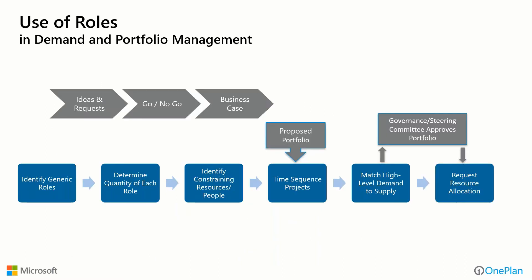All of this comes together — the demand management and portfolio management process really intersects and dovetails with resource management. You get ideas and requests, make go/no-go decisions, build business cases, and then you have a proposed portfolio. In parallel, you've identified generic roles for higher-level planning, determined the quantity of each role, identified constraining resources you don't want to overburden, and there's a time sequencing of when to do projects. Ultimately, you have to match that high-level demand of projects to the supply of resources you have, with some governance or steering committee making those determinations.